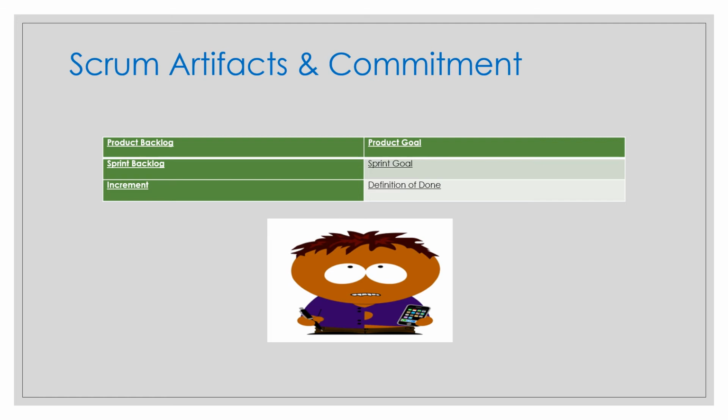Product backlog refinement is the act of breaking down and further defining product backlog items into smaller pieces. This is an ongoing activity to add details such as description, order and size. So for each item you break down into smaller chunks, there will be details, description, order and size, and attributes often vary with the domain of the work. The developers who will be doing the work are responsible for sizing, and the product owner may influence the developers by helping them understand and select the trade-offs.